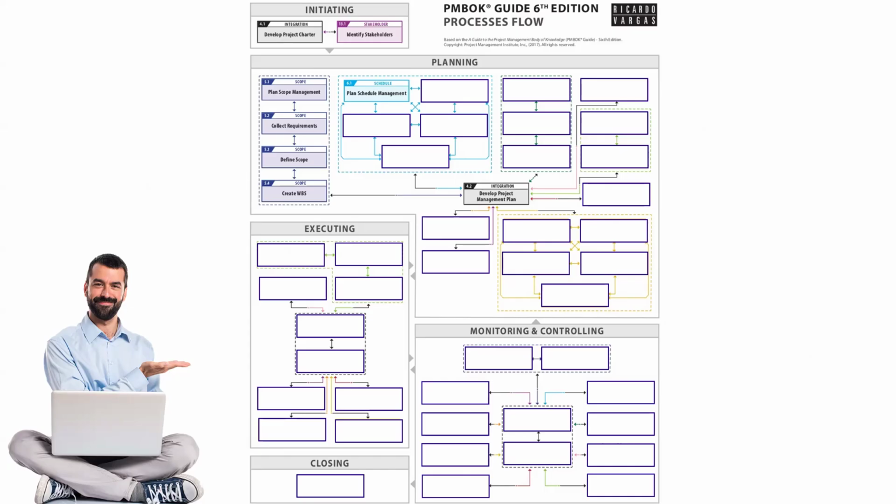To meet the product scope, I have various alternatives. I will analyze them thoroughly and do the cost benefit analysis. Whichever is the best solution, I would pick it up as my project scope. So project scope is a result of alternatives analysis or option analysis. It's not exactly the scope, it's the outcome of it. Once you establish that this is the approach I'm going to be using, that becomes your project scope.